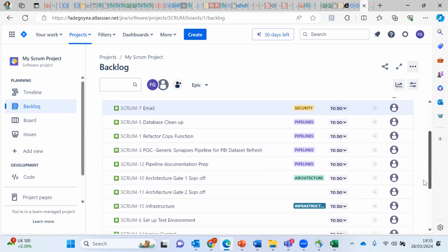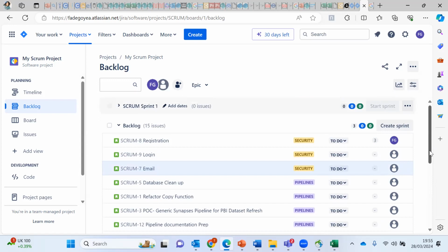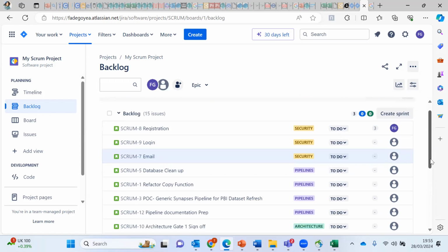And then once we've done all of that, I know, okay, the first 10 that we've pushed up are the top priorities for next sprint, during refinement, all the stuff that you do during your refinement session. Now, let's say we're in sprint planning, for example. So in sprint planning, you're looking at the stories that have been prioritized, you're checking priorities to make sure they're still the same, nothing has changed, the PO has said nothing has changed and all of the good stuff there.